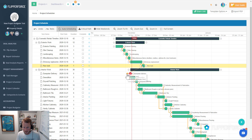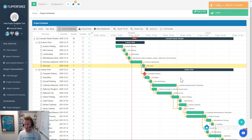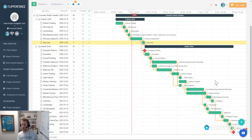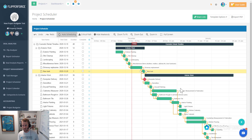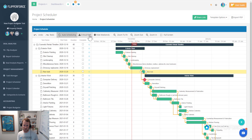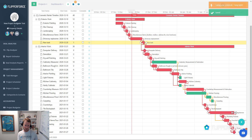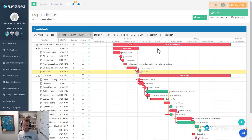Let's make the interior work not start until after the exterior work. Let's make the dumpster delivery a dependency based upon exterior work being completed. Now you can see exterior work starts first, and once it's completed, interior work begins. That affected our overall duration — now it's 48 days versus the original 32 days. Anything on the critical path that gets impacted — anything shown in red — is going to impact the overall project duration and completion date. For example, if we can't get appliances on site due to delivery or availability issues, you can see how that impacts the overall project duration.